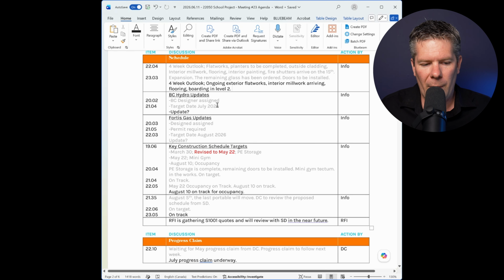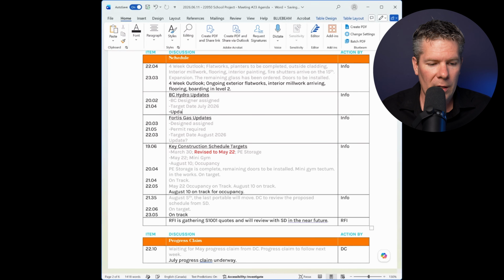So over my meetings, I'll have, oh yeah, we got an update that the designer's been assigned to the project. The next meeting, we had a target date of July 2026. Hey, we're in July right now for this meeting. And then we would go, okay, contractor, how are we doing with this? Where are we at? Yeah, we just got a notice of permit delay. They are scheduled for August 11th. Fantastic. Okay, we're going to note that. We want to keep track because at our next site meeting, when we come back to this and we're past August 11th, what's the plan? What are we doing? Because we're trying to get this in for occupancy or whatever the case is.